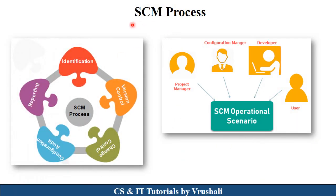The next topic is the SCM process. As per your exam point of view, this is one of the most important topics. There are a total of five steps in the SCM process: identification, version control, change control, configuration audit, and reporting. This SCM process is handled by the project manager, configuration manager, developer, and the end user.